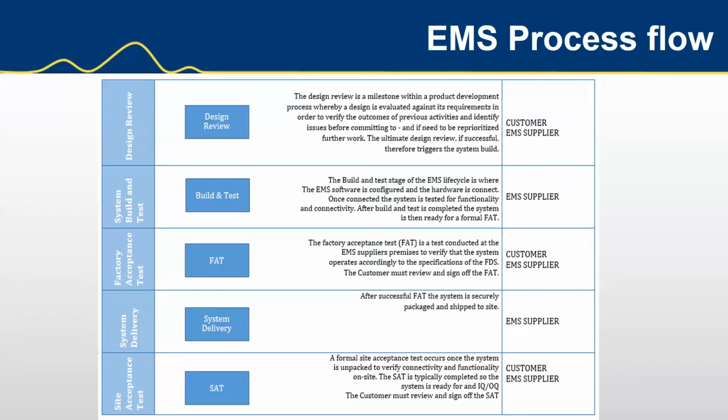With the system delivery then after that, comes the site acceptance testing, like a commissioning. So the site acceptance is kind of like an advanced FAT, because now everything has arrived on site. The system should be installed and put together. And you know, we did talk about the GAMP V model.